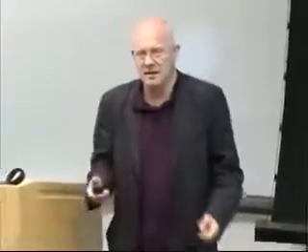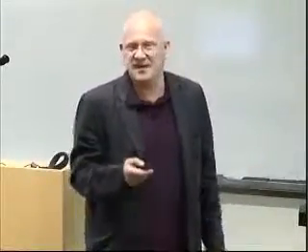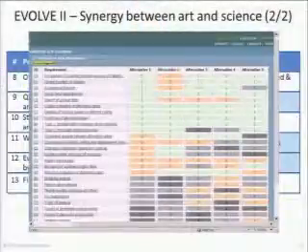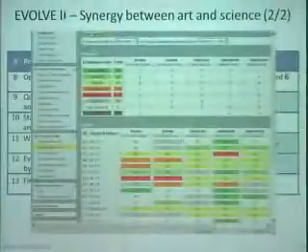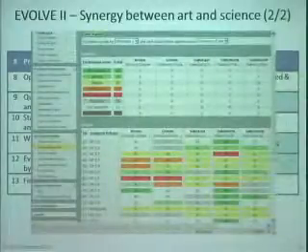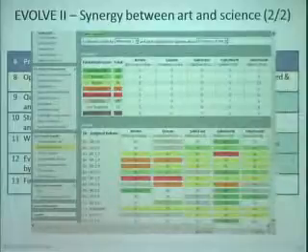But the next part is then, again, the evaluation of the planning alternatives. So that's something where we need the input of the stakeholders, because being optimal, and even proven 100% optimal or close to that, does not mean that this is meaningful in reality. Again, here some examples on that. So these were the different alternatives. This is what's called stakeholder excitement analysis. So that helps you to project the likely reaction of your stakeholders against the plans proposed. Here you find alternative 1 out of the 5, and you see here different stakeholders, and you see for this project with something like 25 features, how often they are very excited, neutral, disappointed, or very disappointed.